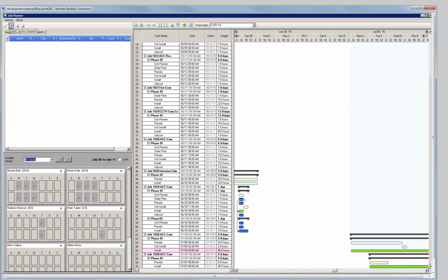So one thing that you can do, I thought I'd mention really quick, is that when you say plan concurrently, it just tries to put all the tasks down in a row, like at the start date. And if you have predecessors on, it will shift them due to the predecessors. But this is when you kind of know that I'm going to have to shift these tasks around, and I just want them in a convenient spot. And that's what that plan concurrently will do.